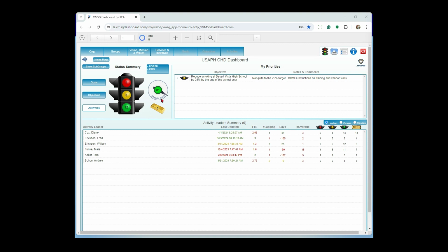So that's how it's doing that calculation. And then what it's doing is adding all those up across 23 activities and saying, aggregately, we're 81 days ahead of schedule. Now, when we get down to below schedule, one day below schedule, it turns yellow. Get to 60 days below schedule, it turns red. So again, the idea is to be able to look at the colors and the numbers and get a snapshot of the performance, in this case, of community health.